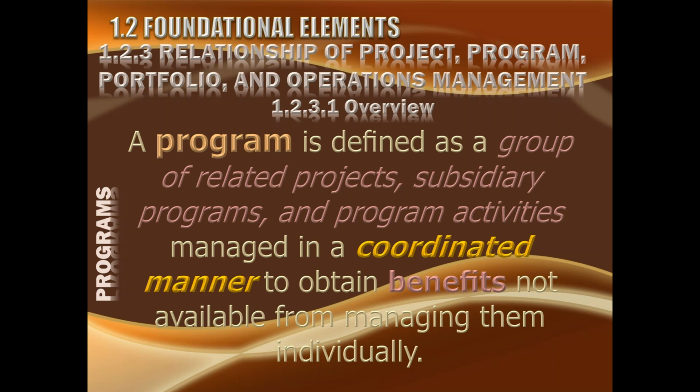So what are the components of the program? Different projects within a program. Then there could be sub-programs within a program, which could further have some projects, and there could be some glue which is joining it all together, which are the program activities which are taking care of the output or the deliverable of various projects. And then program activities are also responsible for unifying the benefit realization into the overall benefit of the program. This is also program activities responsibility.